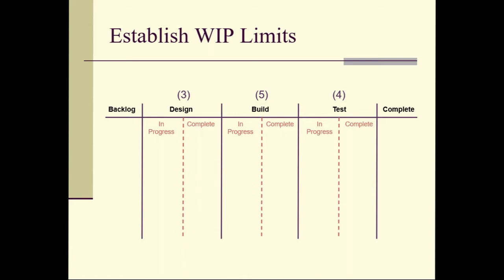Here's a quick example of this. There was a study done a few years ago. They took 8-hour activities that took exactly 8 hours to work, and people were only allowed to work 8 hours in a day. Obviously, if you did these in order of priority, you would get one done Monday, one Tuesday, one Wednesday, one Thursday, one Friday, and it'd take the week to get all 5 done. But instead, they forced people to work on each of the 5 items every day.